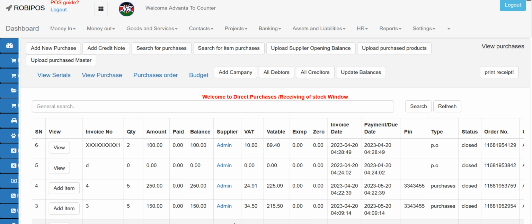So you print an internal document to request the management of what you want to buy, or we call them requisition notes. Once you are done and it is approved, then you can make what is called an LPO, local purchase order, to the supplier. If the supplier accepts, then they deliver. Upon delivery, you print what is called a goods received note, GRN, and through that a supplier can be paid.